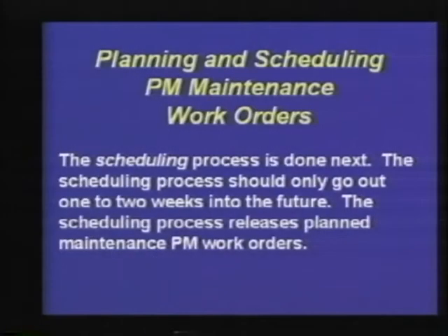And then the PM scheduling process relative to the third paragraph has to be commingled, if you will, or coordinated with the production operations planning and scheduling program. We're going to talk about the need of that step a little later, but those are the 3 major steps.